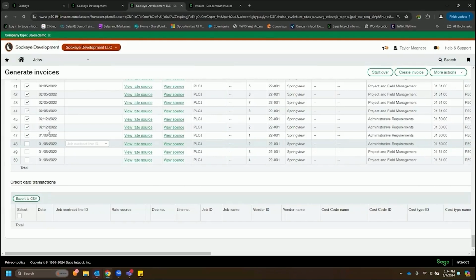And then our output, as far as what this looks like, all of our printed outputs from within the system are essentially just Word documents driven by mail merge fields. So our output is open to us to define. And then we can also have a supporting report that lays out any of those actual to budget versus total draw to date, all those comparisons that go with the typical draw package for us.